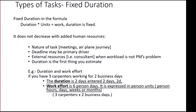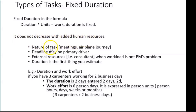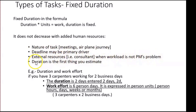So what is fixed duration? In the formula Duration × Units = Work, duration is fixed — it does not decrease with added human resources. There are instances when that is relevant, for example the nature of the task: meetings, airplane journeys — it doesn't matter how many people are on the plane, the duration is the same. A deadline may be the primary driver. Duration is the first thing you should estimate in these instances.